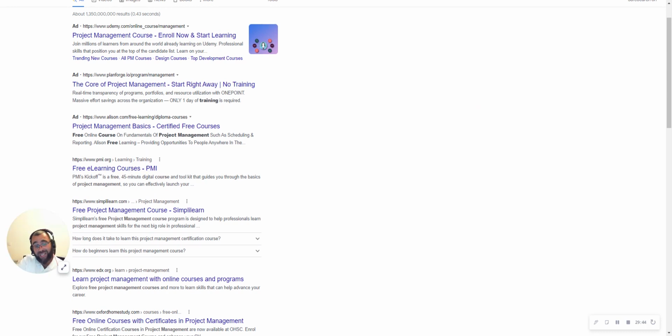Because setting up a platform for a big organization can take 2 to 3 months, right? There is a lot of people to get involved. The people that purchased HubSpot might not be the same people that are doing the onboarding with you, that are giving you all the information for you to help them set up. Sometimes, but what you need, for example, you need sponsor. That CEO that purchased HubSpot, you want to copy him in all emails to make sure whoever is doing the setup with you or answering the question is doing his job.